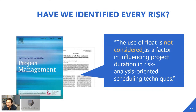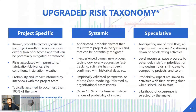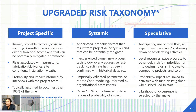So we now expand the taxonomy of risks. We have cardinal/inherent risk, project-specific risk, systemic risk — and now we're adding a new category: speculative risk. The arch-classic and most important example is using total float in simulation, which is an expiring resource. Other examples include slowing down or accelerating activities and asking: how does that impact my project duration distribution?